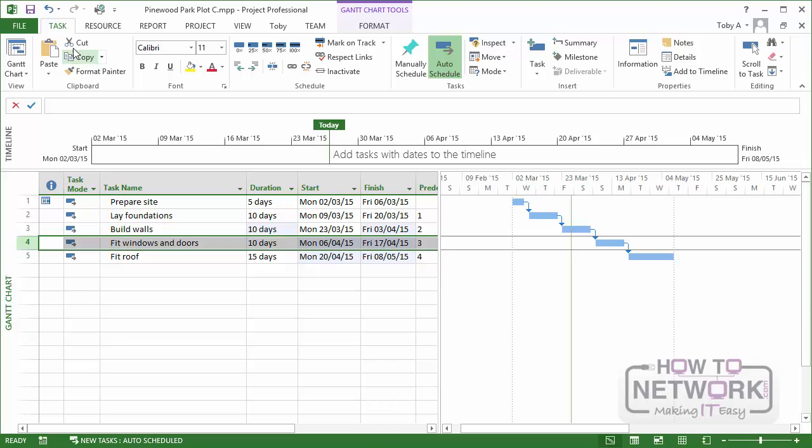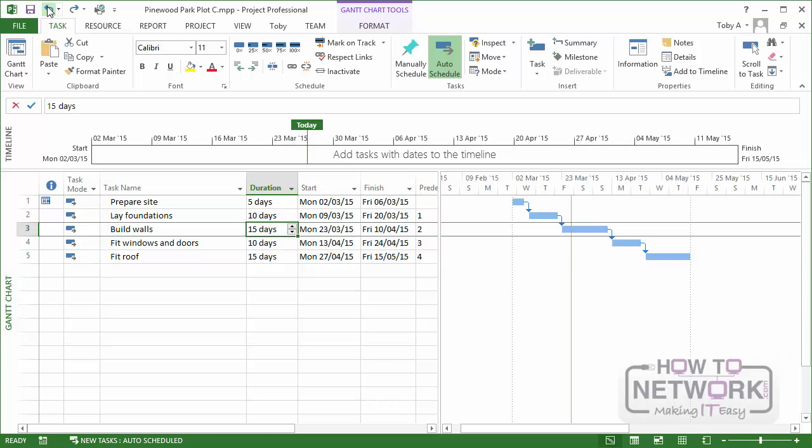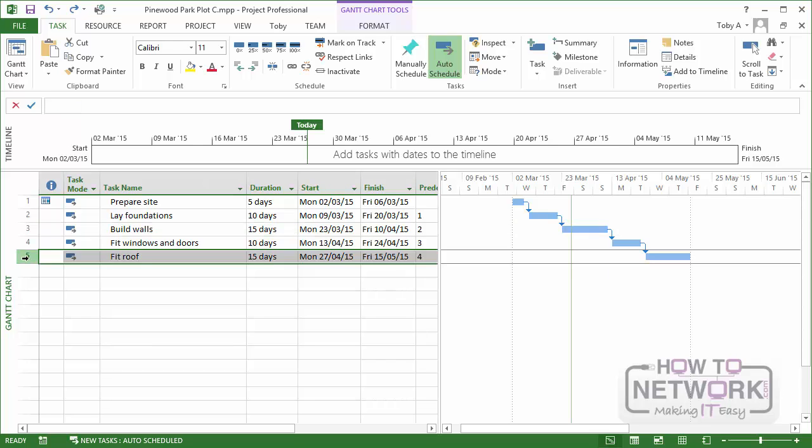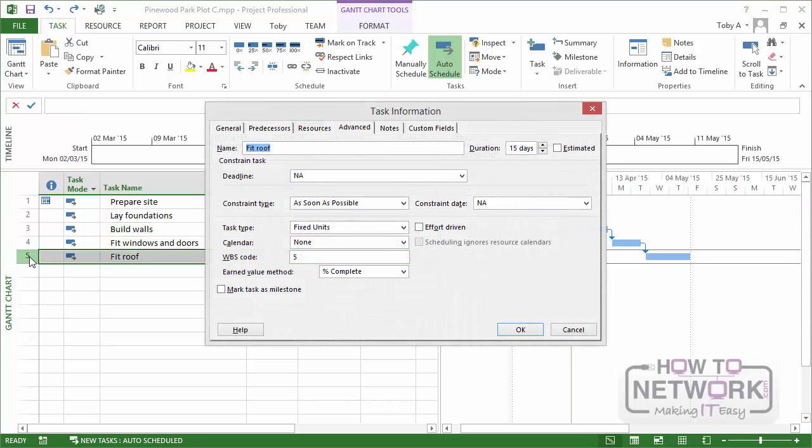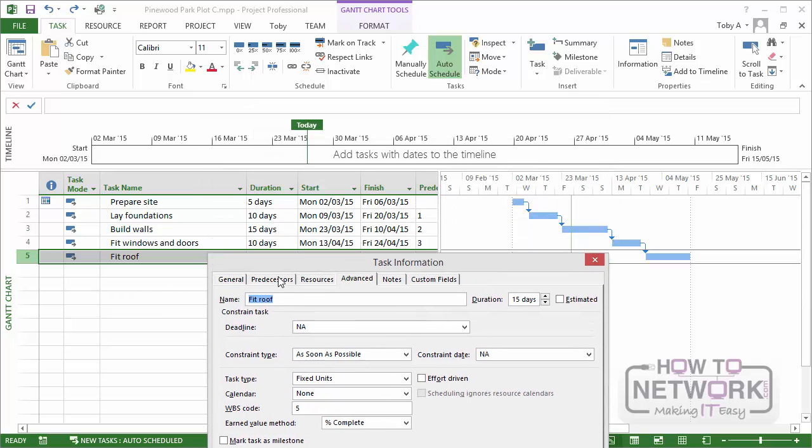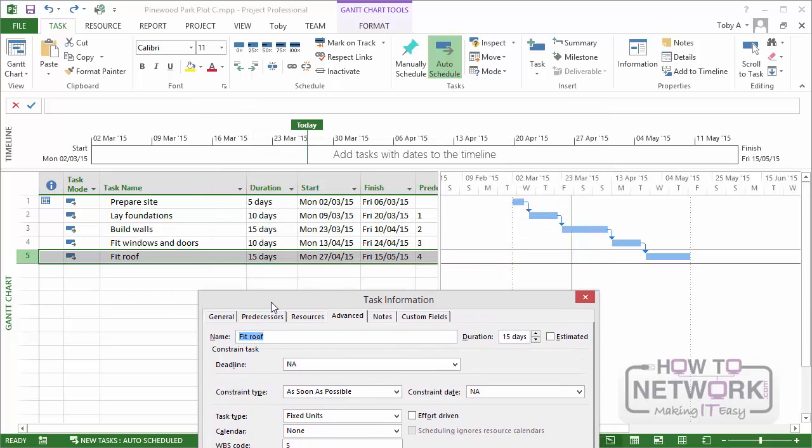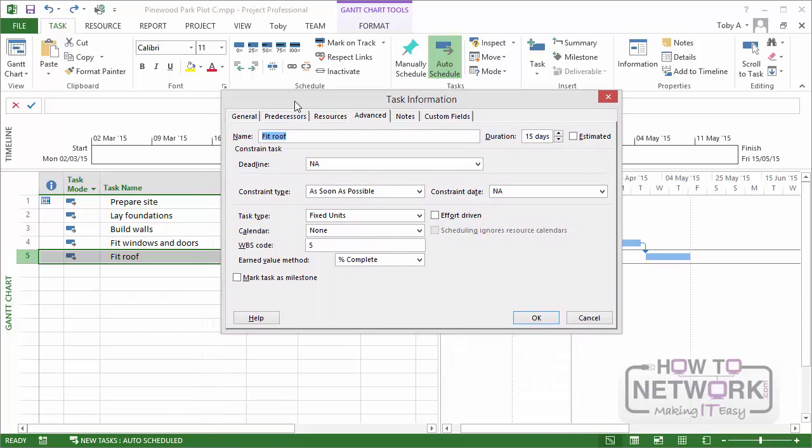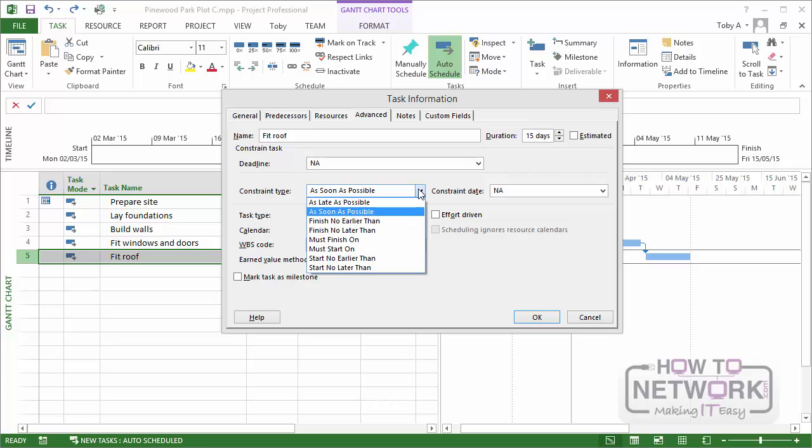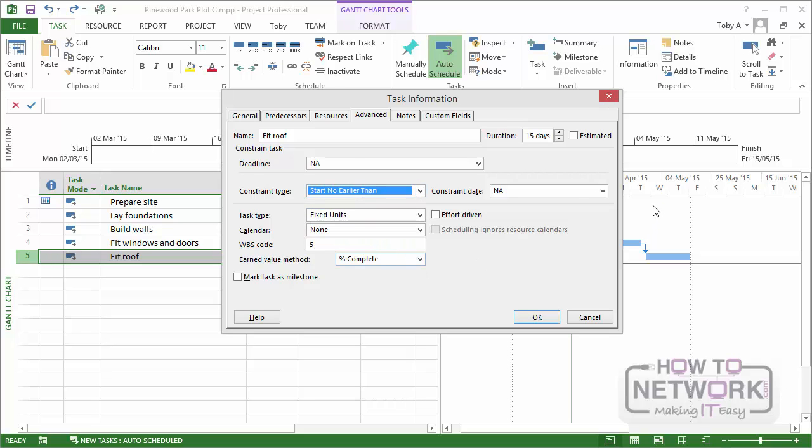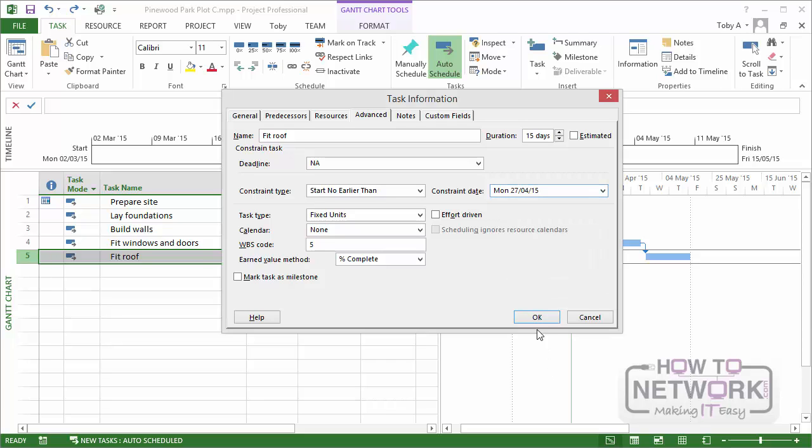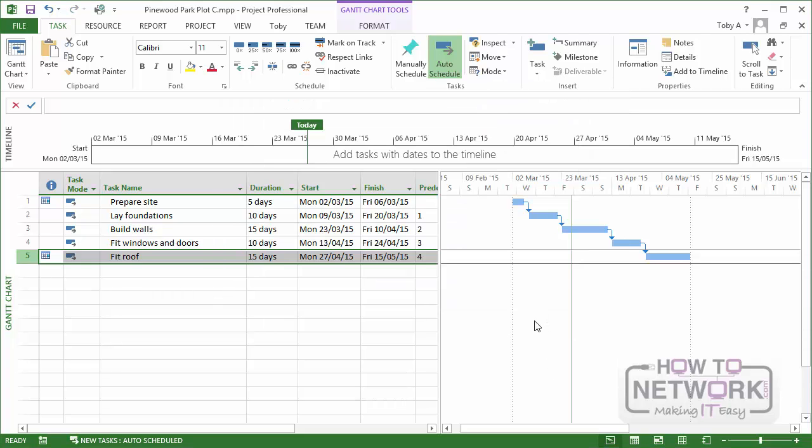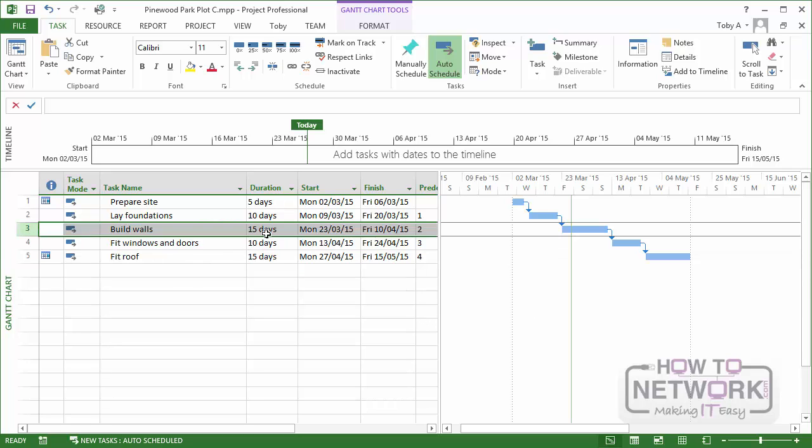Now let me undo that, put everything back the way it was, and let me put a constraint on the FitRoof task. Now let's suppose that because of some permits or insurance or something, I can't actually start that task earlier than April the 27th. So I'm going to say, start no earlier than, and I'm going to put it in a date of April 27th. So for some reason, I'm not actually allowed to start the job before then.